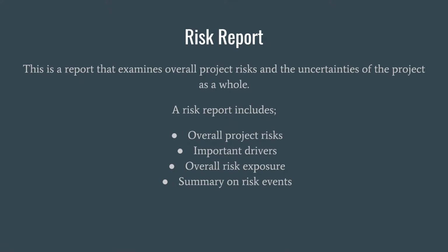Another critical output of identifying risks is the risk report. This is a report that examines overall project risks and the uncertainties of the project as a whole. A risk report includes overall project risks, important drivers, overall risk exposure, and a summary of risk events.